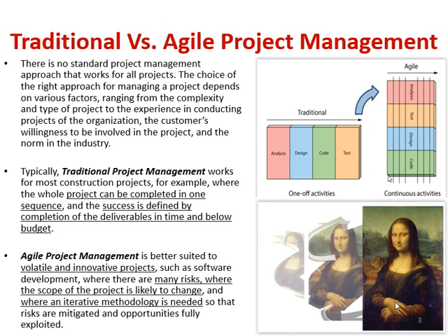So we have one-off activities. That is, one activity is completed, and only then can we start the next activity or phase in a project. But what Agile says is, we do things in a continuous fashion. That is, we split the project or the final requirement into iterations, and we do the similar tasks, that is analysis, design, coding, but per iteration.